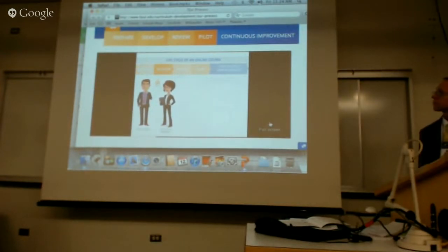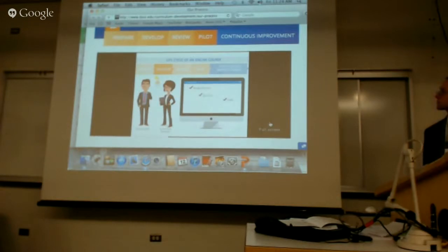The development semester contains the most concentrated effort in the course development process. The course council works together closely, meeting at least weekly to compile all the necessary components, such as assignments, labs, quizzes, etc. Some face-to-face learning activities transfer well to an online course, while others need a completely different approach in order to be successful in an online classroom. In addition to the work of the course council, media developers create graphics and videos for the course. Furthermore, all other outside resources, such as library materials and external software tools, are incorporated at this time.